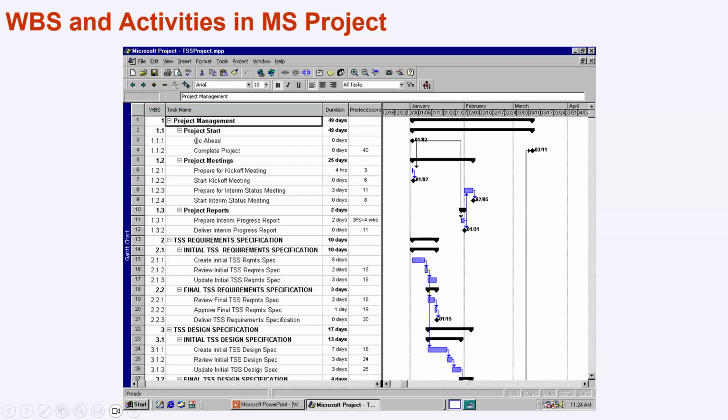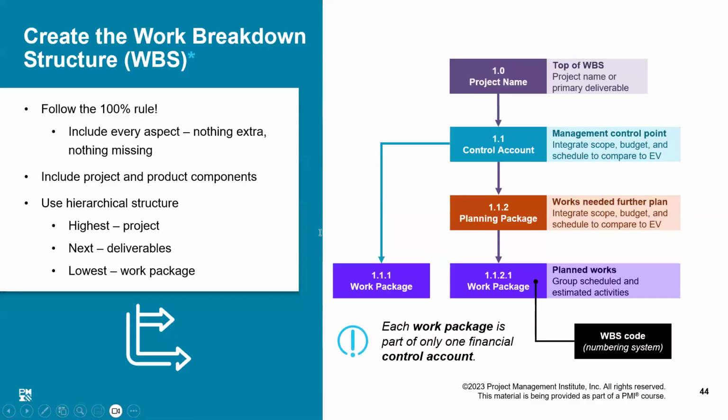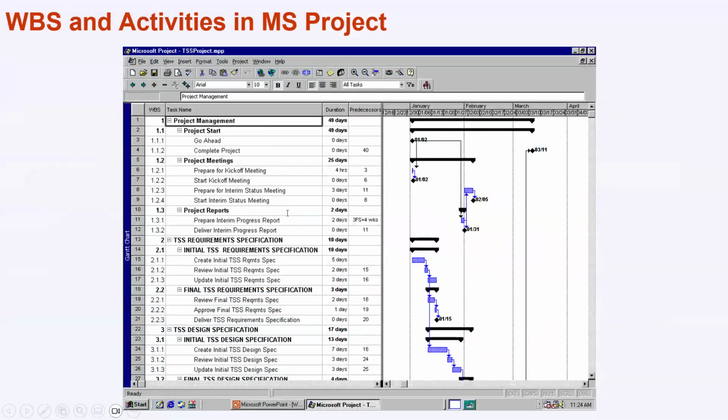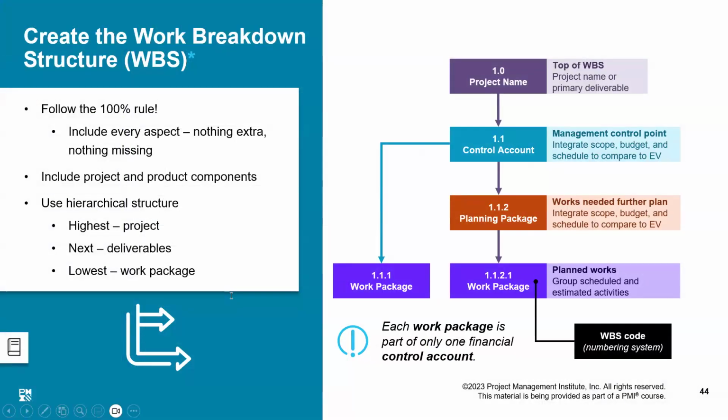Theoretically, we are discussing two different steps. One is creating the WBS, another one is defining activities. Practically, it is one step. We will do it together, but there will be a differentiation. These are WBS levels, these are activity levels. In Primavera, it will show us color bands. So this will be shown in one color, this will be another color. Activities will be without background color. I will show that in the schedule. Right. This is what we were discussing.